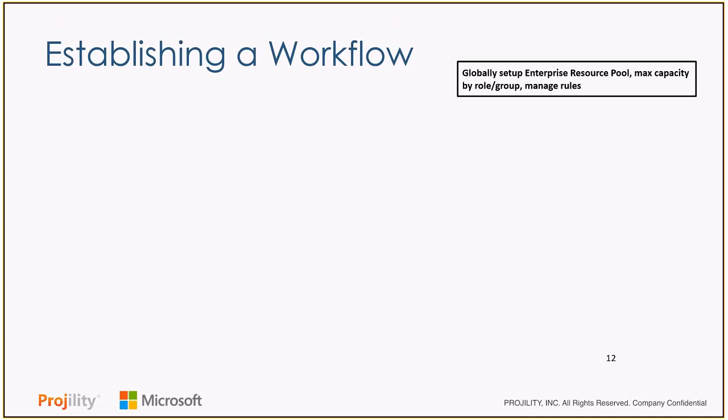We're going to be setting up things like maximum capacity. We're going to be setting up different groups and roles. And we're going to set up the rules behind that, who has access to request and get to what information and what resources. Establishment of that resource pool is the most important part of Project Online, especially if you're going to do resource management. A lot of organizations skip over that.